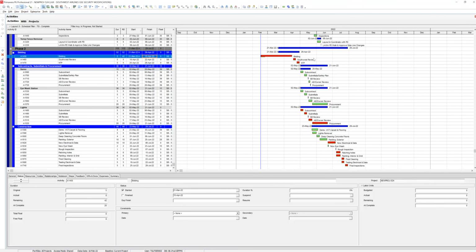Perfect. So if next Friday we submit it, Southwest is gonna review for 5 days from April 18th to April 22nd. We get an NTP on April 29th. So on May 2nd, you start contracting all your 3 critical guys, right? So now you're in July 29th. Which is cool. No, you're a month off of what you had.